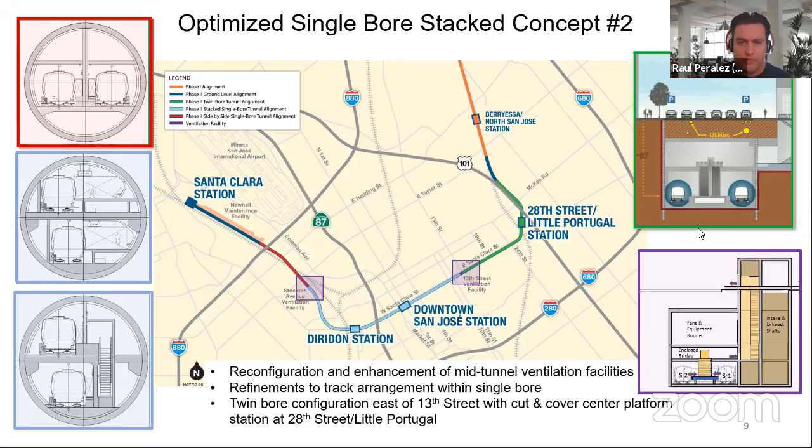And so in regards to the construction and the options here, I do really appreciate staff's work to try to come to a conclusion that can keep us moving forward. I was really concerned with the growing cost of the enlarged bore, and then clearly hearing the fact that there may be some challenges with getting competitive bids on who may be interested in doing that.